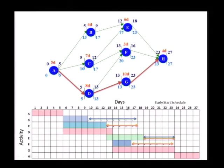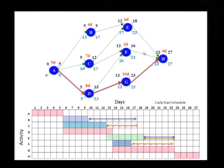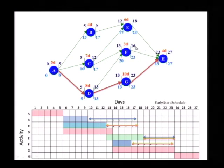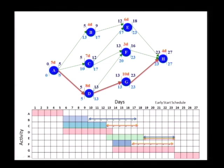Now F — total float of 7. F can move all the way to the end; it can end on 23, and it will not hamper anything else. Free float is also the same.